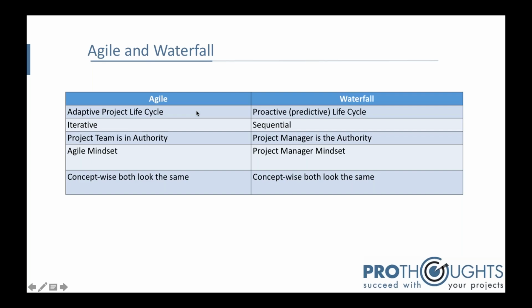Okay, so one of the principles of agile says keep it simple, in the sense that for most products, agile argues that only 10 or 20% of features are used. So people do not use all of the features. So rather than focusing on developing the complete product, pick up the most useful feature, develop that, and show the value of that feature. And if it's accepted, then build other features in the product. So that's where the adaptive nature of agile comes into play.